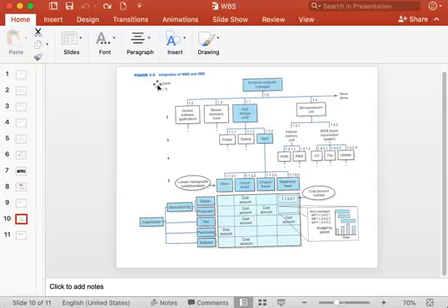You can see level 1, level 2, level 3, level 4, level 5, where you have the work package for making the motor, another work package for circuit board, another work package for making chassis frame, another work package for read write head.